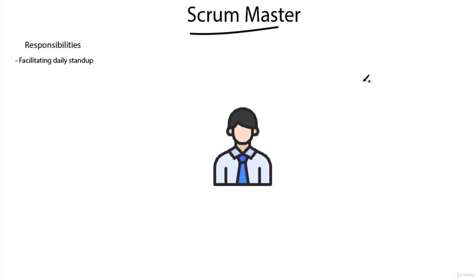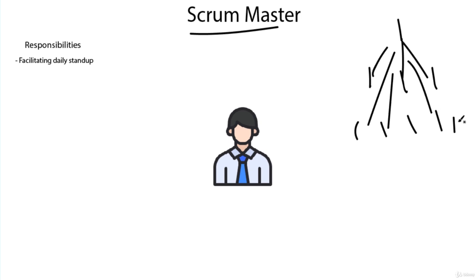Now, with the daily stand-up, this is important. He is not running the daily stand-up. He or she, Scrum Masters can be anyone, but he or she is not running the daily stand-up. It does not look like this, where he or she is sitting at the front and you have a whole bunch of people all looking at the Scrum Master, and the Scrum Master is giving direction and asking questions, and everyone is just looking there. That's not how that works.